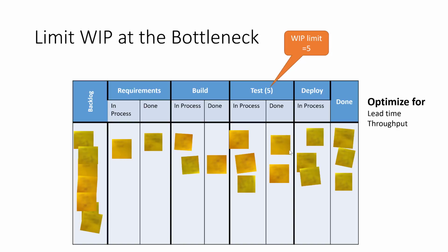And there's exercises I'll explain in the airplane game video on how to actually do this and see it working in process. But you'd limit the work in process there, say to 5, and that would help throttle the system. What you're going to find is if you improve this one to get work to flow through more smoothly so that the one behind it isn't delayed anymore, all you'll do is move the bottleneck, right?